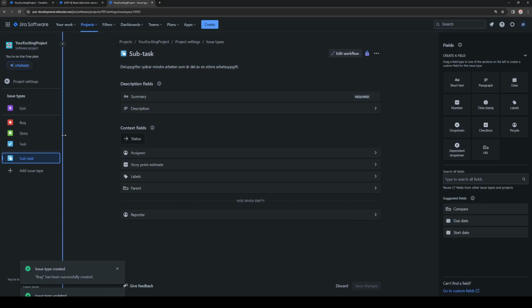But sometimes people can create subtasks within a story to keep track on the micro level, if I can say so. Assume that we are talking about a story to create a Git repository. To keep track of all small details needed, I would create a subtask to create a Git repository, to manage access for that repository, probably to set up the pipeline, just to have it set up correctly. So that will be a small subtask to keep track of the work. The way to split work totally depends on the team, a company, and Scrum Master, of course.